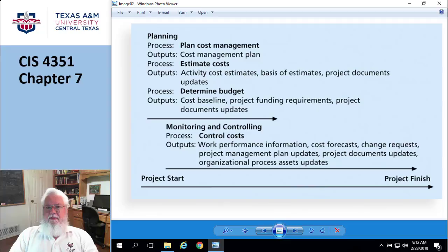And one of the things they talk about is if you're doing life cycle costing, don't skimp at the beginning. Don't say, well, our costs are going to be low and they're going to ramp up. That's probably not correct. The costs are going to be kind of high in the beginning part of these things, which is the planning and requirements, all those process groups we talked about a gazillion times. So particularly don't skimp on anything dealing with requirements gathering. If you skimp there on your budget, and of course, downtime is if you don't spend money getting the requirements correct, and then you have to stop the project and do it over again.